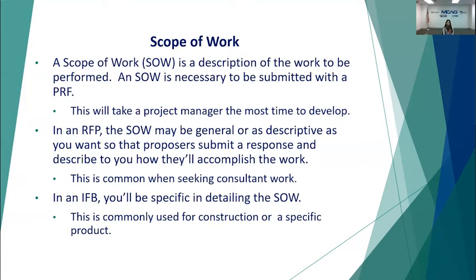In an RFP, the scope of work may be general or as descriptive as you want, so that proposers submit a response and describe to you how they'll accomplish the work. This is common when seeking consultant work. If it's an invitation for bids, you'll be specific in detailing the scope of work. This is commonly used for construction or a specific product.